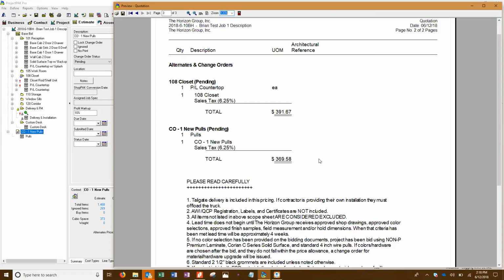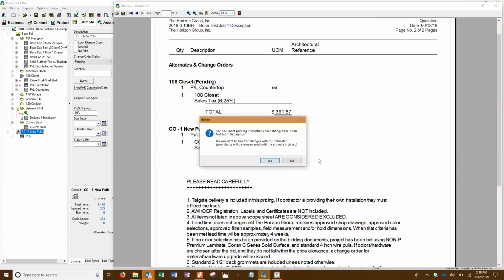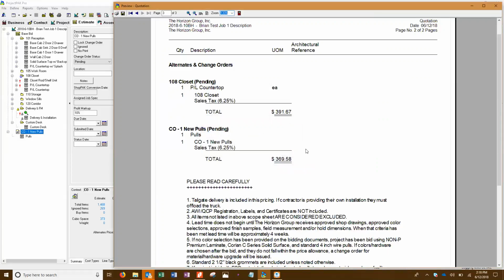I never know, when I'm bidding, if the project is taxable or not taxable. Sometimes they'll tell you, but. Yeah. Well, this one we've got set up to be taxable. So again, I'm of the mindset where I would rather show the tax and have the customer come back and say to me, hey, I'm non-taxable, here's my tax exempt certificate, than forget it and turn around at the end when I start to bill and say, hey man, I've got to charge you tax, and they freak out on you. Well, that wasn't on the contract and da-da-da-da-da. It's like, oh my gosh. I mean, I would almost have something like that in my bottom scope.